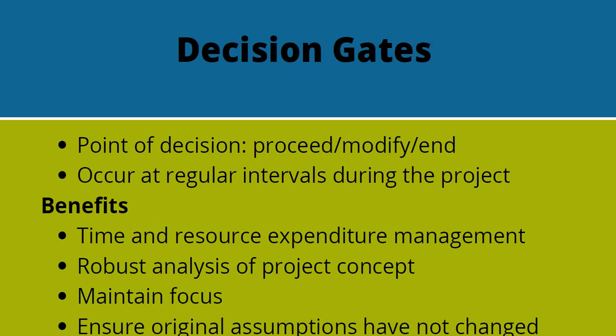Decision gates also enable the project management team to maintain focus. Once you begin to do research, interact with the community, you're probably going to find out about other needs that would either expand the scope of your project or are unrelated to your project that might be real needs, but it's important to maintain focus, avoid scope creep, which means avoid letting the project get bigger and bigger and bigger and go beyond the original scope, the original issue it was designed to address.